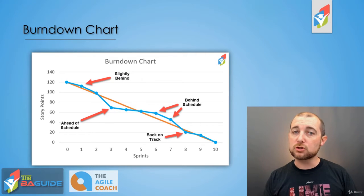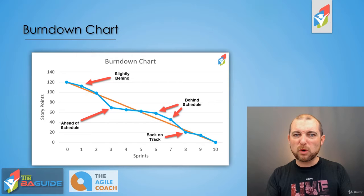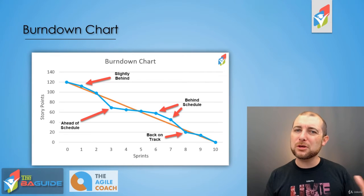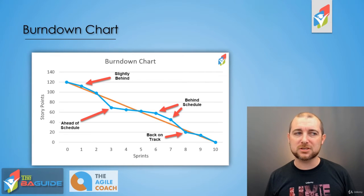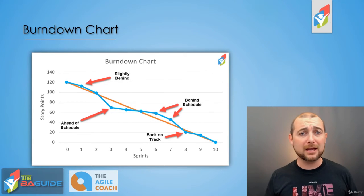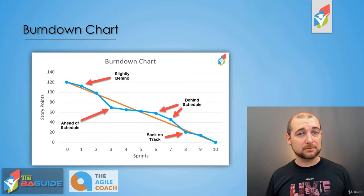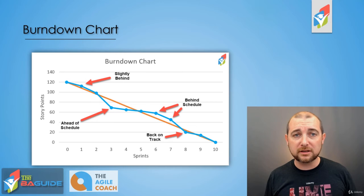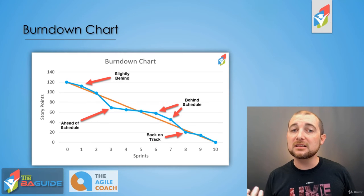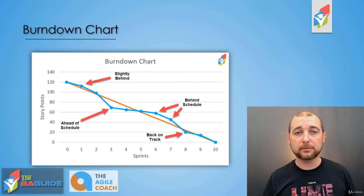The burndown chart was created to help give a visual representation of where you're at, so you can make adjustments. You know if you're behind or ahead — you might be able to add some additional nice-to-have features and stay on the same timeline, or maybe you can move up your delivery date and deliver that overall project value sooner.